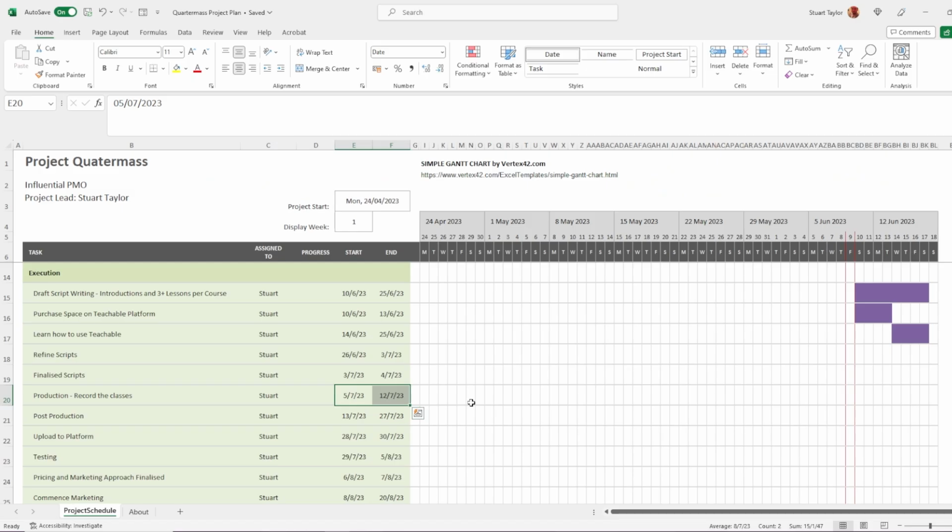I'm going to record all of the classes in 1 week. The motivation behind that is that I'll set up the studio once, which is incredibly time consuming. And then I can just focus on recording a course each night and give myself a few extra nights in case things go wrong in the recording. I won't try to record them all on one day because I'll just be exhausted and the quality by the end will just be terrible. If I attack this schedule aggressively, I might be able to compress some of these activities, get them done sooner, and that'll give me a lot more confidence going into July and August that I can get this project completed on time.